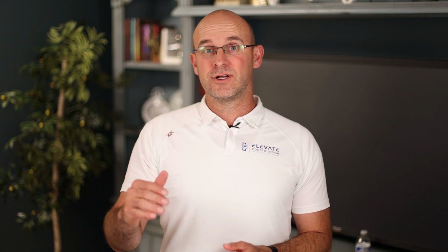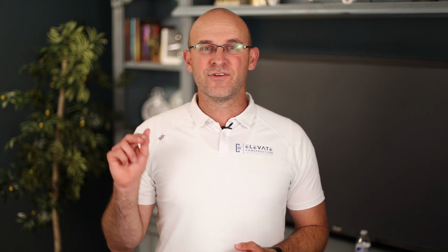In fact, I have never in my 25-year career ever seen a project manager with 6 or more projects and have it land in anything but disaster. And I actually have some data to prove it. In one company specifically, they track the success of each of their projects. And I remember going to a company where one PM had 9 projects, was so spread thin, most of them were failing. That was the first thing we fixed when we started working with that company.